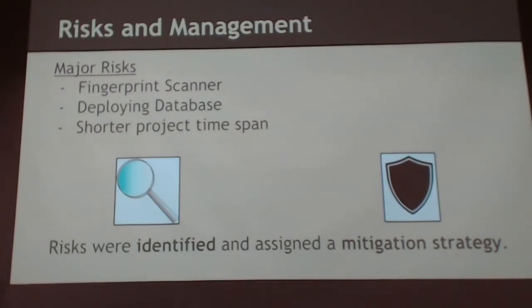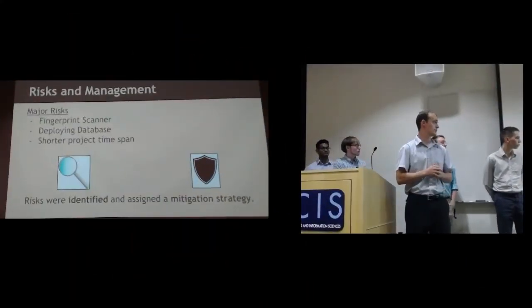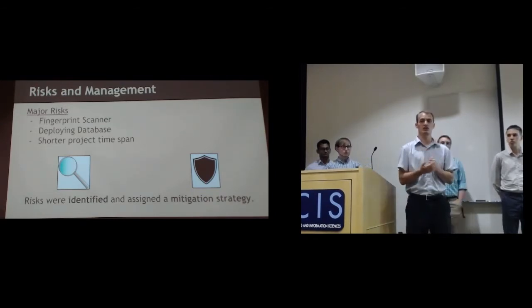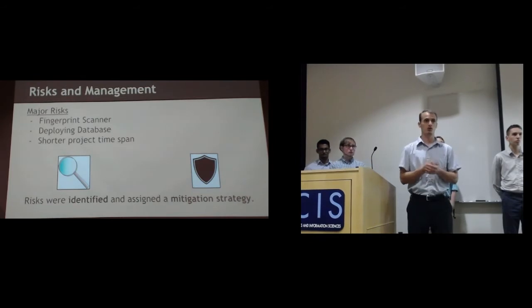At the beginning of our project, we wanted to assess any risks that we were facing and come up with a mitigation strategy for those early on so they didn't trip us up later in the project. A big risk that we were worried about was the fingerprint scanner. As I had mentioned, we wanted to provide authentication that patients were attending the day health program sessions, and the fingerprint scanner was the requested solution to that. We were worried about it because it's external hardware and external software, and we weren't sure if we'd be able to integrate that in the time allotted to us.